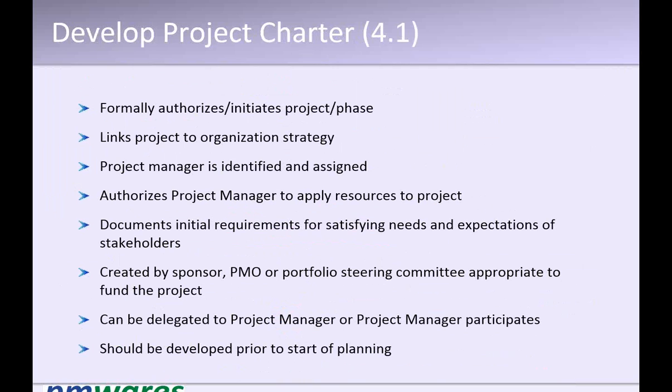So the project charter contains the business case, why we are doing so, and measurable objectives. Measurable means they should be quantifiable. Best in class is not measurable. Good product is not measurable. Significant market share is not measurable. 10% market share is measurable, is quantifiable.